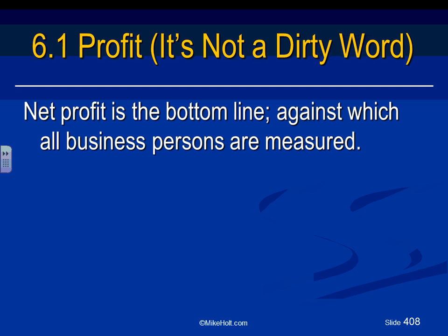So profit, guys. When you do a business, when you have your break even, it means you've covered everything: your overhead, your labor, your gas for your vehicles, everything is covered with the so-called break even. After you break even, you're supposed to put a few percentages. It goes from 5 to 15% profit for the owners, the shareowners of your company. That will go to a trip to the Bahamas,